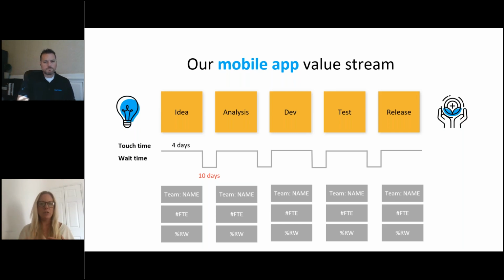So when you do your future state map, you do exactly the same thing, but you talk about those improvements. What would happen if we automated testing? What would happen if we didn't have to wait 6 weeks for security to do a penetration test? What would happen if we didn't have to wait 8 weeks for an environment to be provisioned? What would happen if we didn't have to wait 4 weeks for a shared test environment to become available? All of those sorts of questions. So we resolve all those questions and we're like, right, now we can take that delay out, and we can take that delay out. And we end up with a new cycle time.